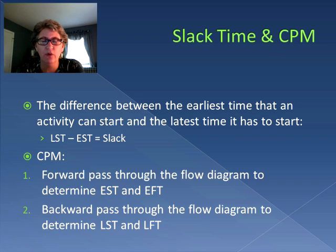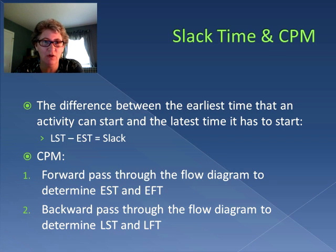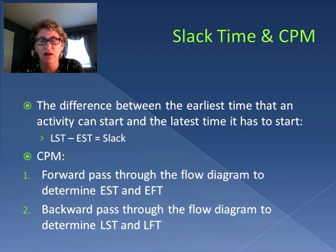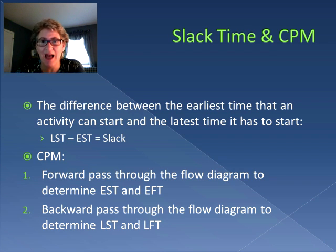We know that the critical path is the longest path through the entire process, but some paths are shorter in time. So that means there's room for delay, and that's what we're looking at. We're trying to figure out how much time there is between when an activity can start — which is the earliest time it can start — and when an activity has to start, which is the latest time it has to start. Slack can be said to be the difference between the latest start time (LST) and the early start time (EST). That tells us how long an activity can be delayed before it has to be done.